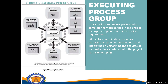The processes in the Executing Process Group may generate change requests. If approved, the change request may trigger one or more planning processes that result in a modified management plan, project documents, and possibly new baselines. The Executing Process Group includes the project management processes identified in sections 4.1 through 4.10. Here is the table for the Executing Process Group. The dashed circular arrow indicates that the process is part of the Project Integration Management knowledge area, which coordinates and unifies the processes from the other knowledge areas.